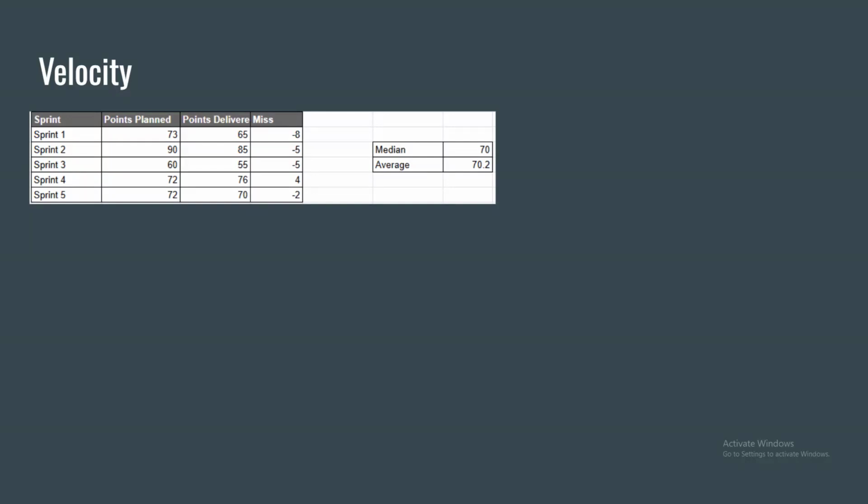So what it means is, for the next sprint the team can fairly say, okay, I will not take more than 70 points. And they will look at the available capacity and say, if my capacity is similar to what my previous sprints were, in the number of devs that are available, devs, DBAs, whoever is working, and by dev I mean your team, your builders, if that is the same, then you should be able to deliver a similar number of points, the median, which is 70.